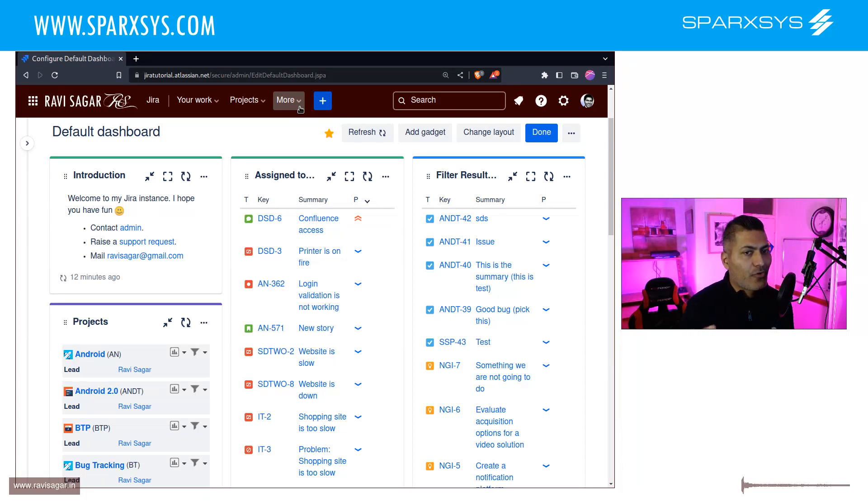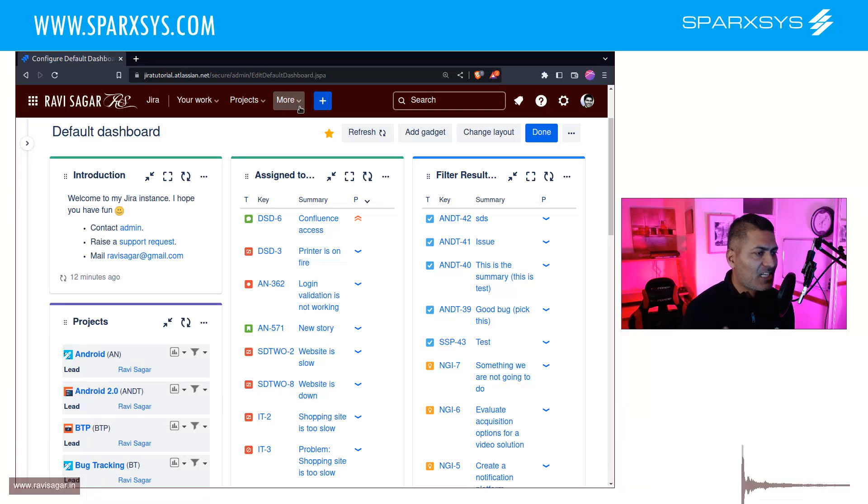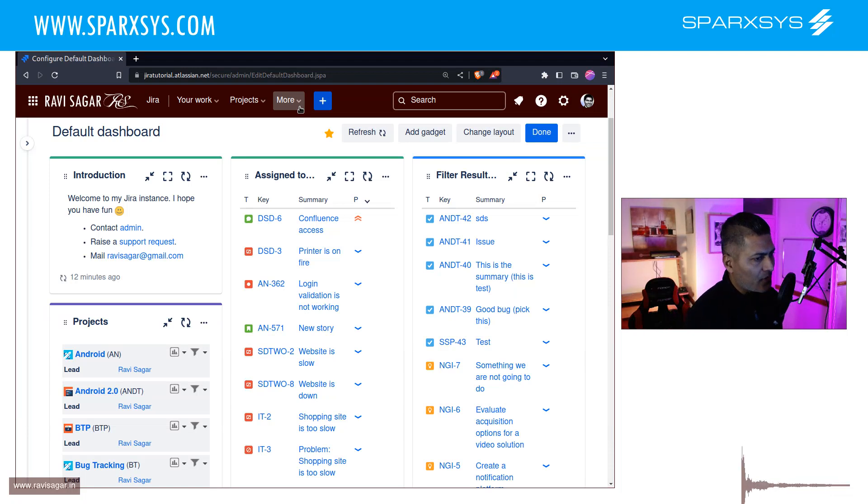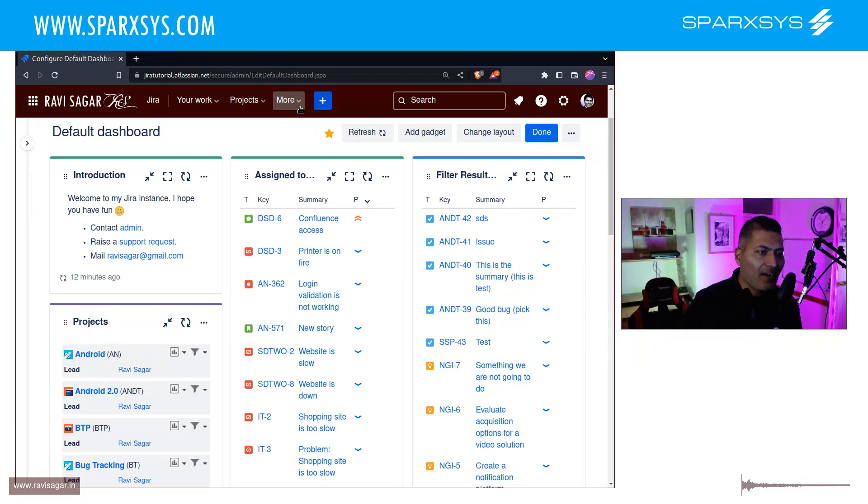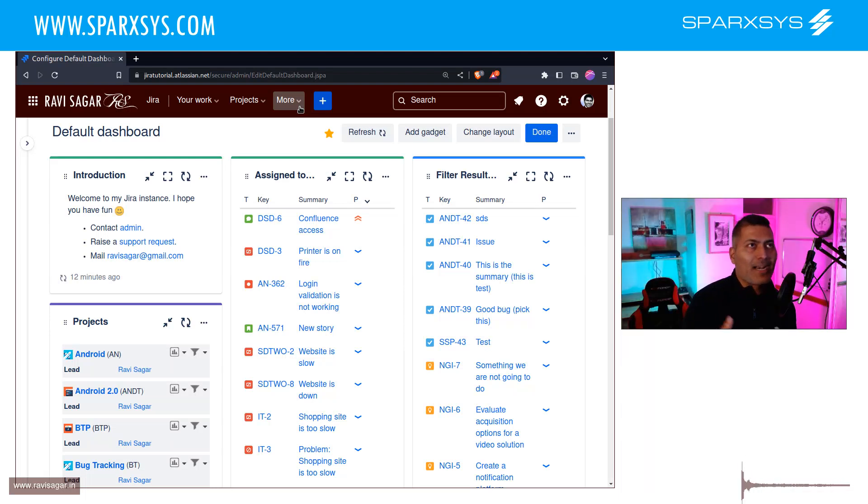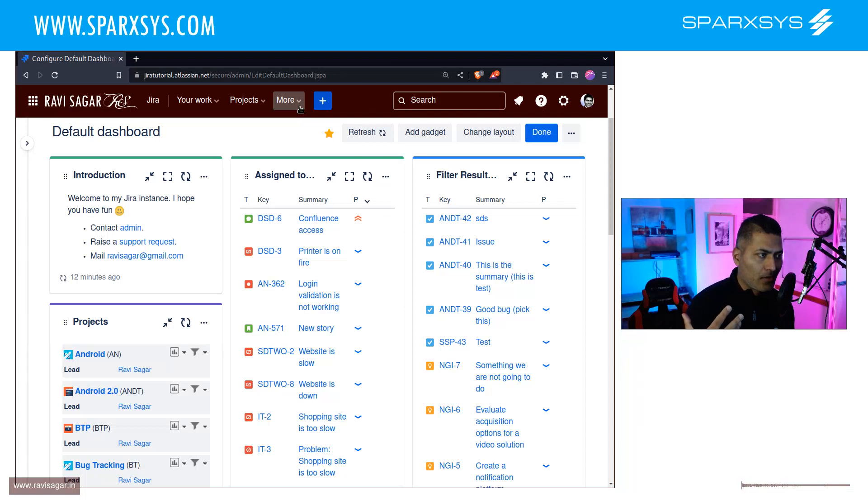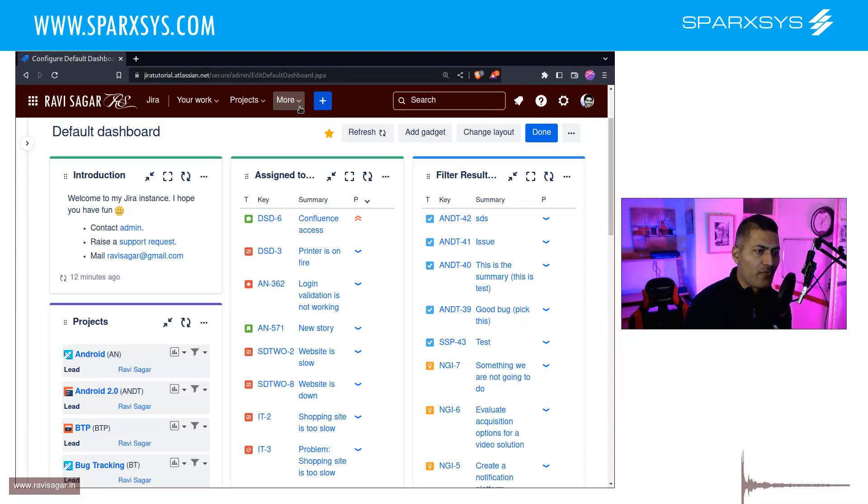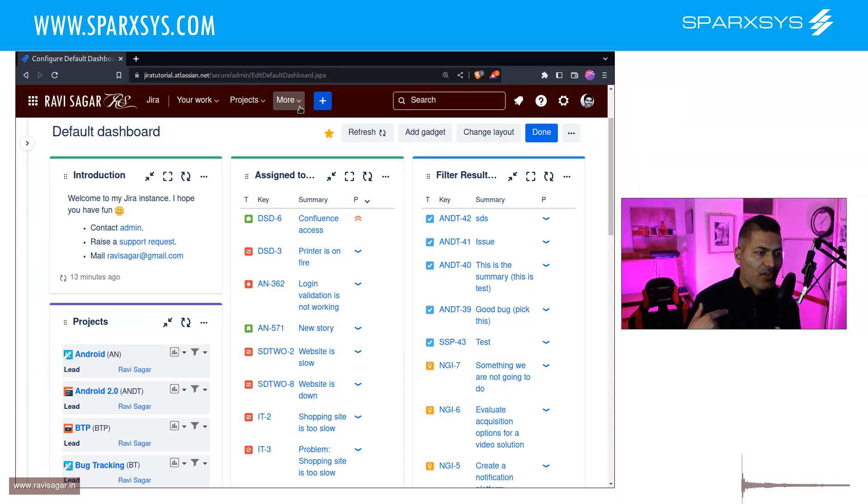And this is also true for cases where you're working on, let's say, agile board. And when you work on the agile board, you may have some filter based on some field, and that particular field could be let's say epic link. So basically, you only want all the stories and bugs and tasks to appear on the board where there is an epic link. So basically, anything that is under your scope.